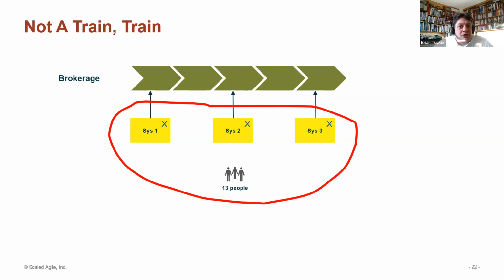Internally, though, it was not a typical agile release train. In the end, we set up a team of managers that manages the contracts and relationships with suppliers, and the engineers were already acting as a team. The teams were kept aligned by having a product owner and scrum master common across both teams. The teams fell in line with the organization's PI and iteration cadence and did a cut down version of PI planning to generate their objectives, the PI.